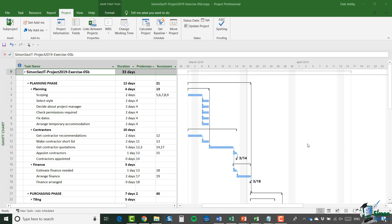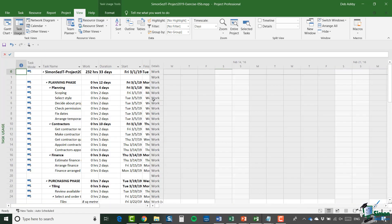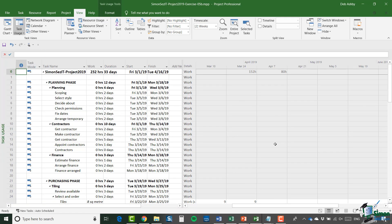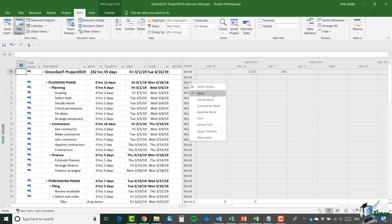The first thing I want to do is take a look at Task Usage view again, so I'm going to jump across to the View tab and click Task Usage. You may recall when we looked at this before that we can see the work for each of the tasks, and where resources are assigned to a particular task we can see the amount of work that each resource is scheduled to do. If I right-click anywhere on the details column and hover over where it says Work and right-click, it brings up a contextual menu — a list of items I can show in the time-phased half of this display. Not only can I show Work, but I can show Actual Work, Cumulative Work, Baseline, and also Cost.